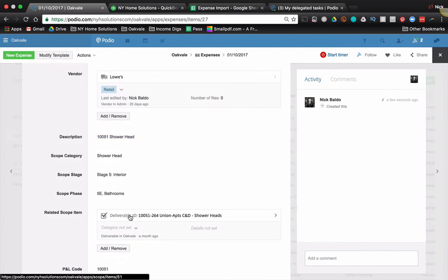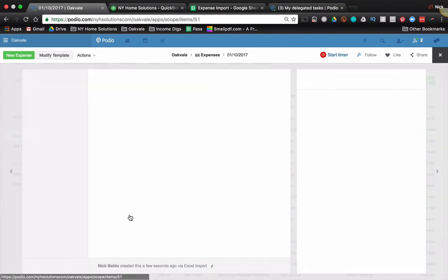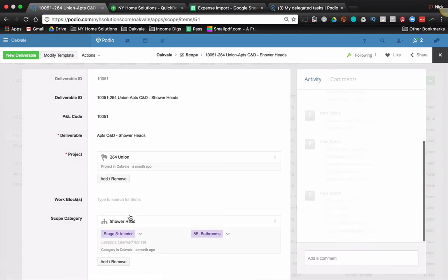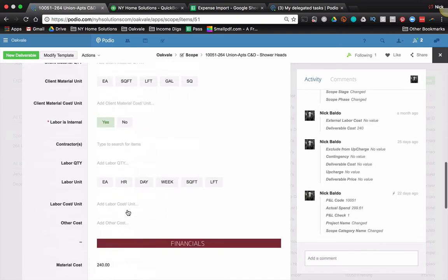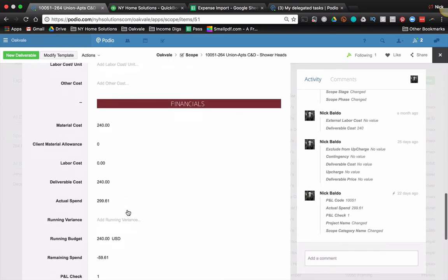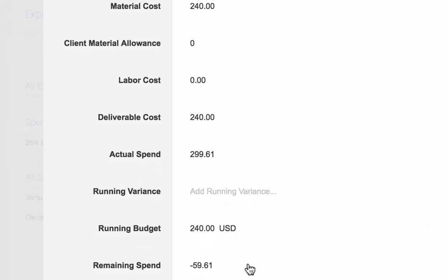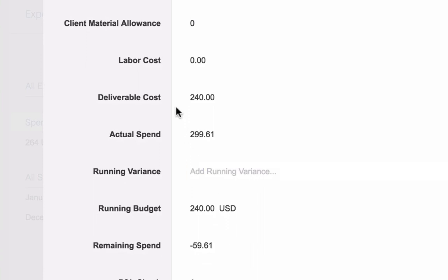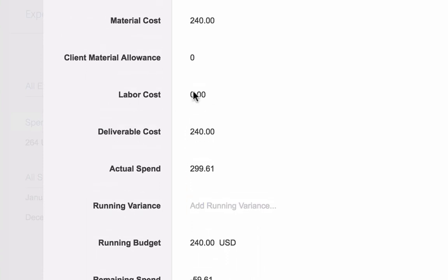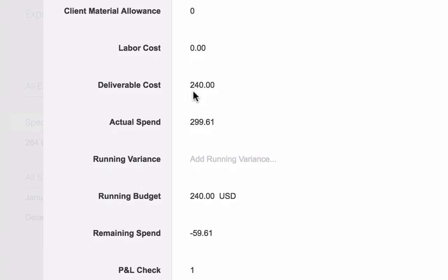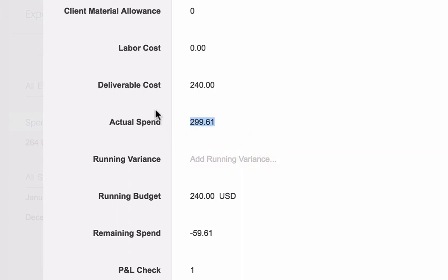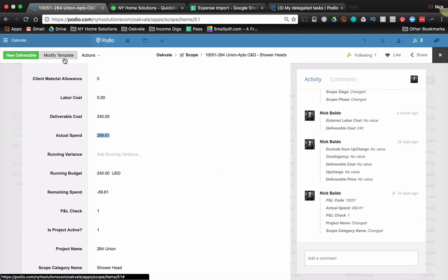Now, when I go to the related scope item, because I have the expenses in here, I'll be able to calculate the actual spend field. So if I go to my scope item and scroll down to my financials, you see that I had a budget of two forty, but my actual spend is two ninety-nine sixty-one. So I spent a little bit too much, but whatever, that's fine. I just want to be able to track it. So the actual spend calculates in.